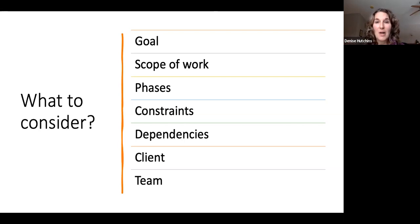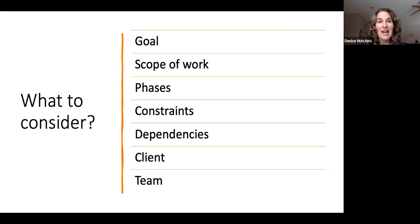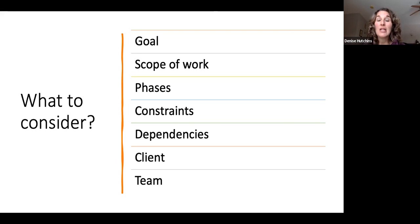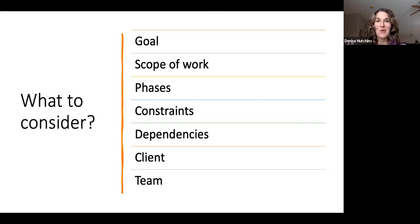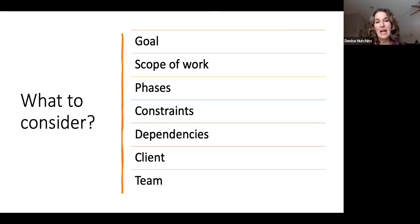Consider your constraints. In our world, a lot comes down to semester timing - we only have a certain amount of time to accomplish something. Budgetary constraints definitely come into play. Understanding what those constraints are is part of this process - sometimes they're clear upfront, sometimes they become clearer as we move forward. Also consider dependencies: what has to happen in order for other things to happen? Understanding those things that cannot slip is critical, or we'll have a real problem at the end of the project.